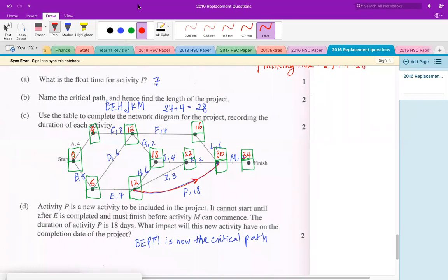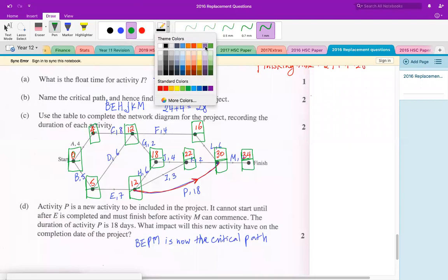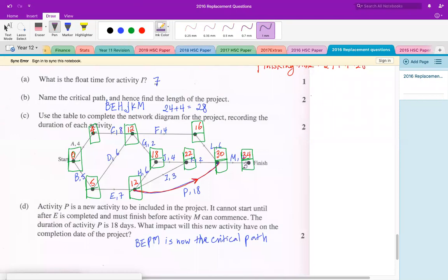And then you do backward scanning. So backward scanning is when you choose the smallest number. So you have 34. I hope I do this correctly. And then 12, 5, 0. And this becomes 28, 24, 24.